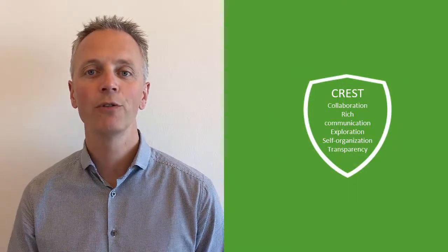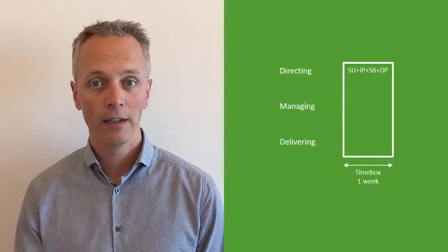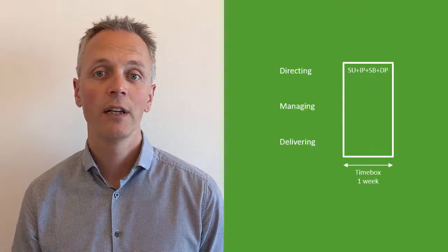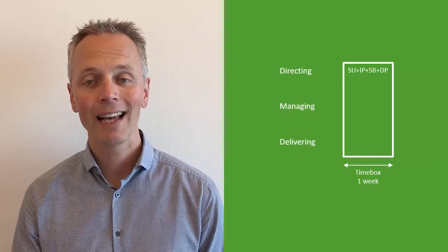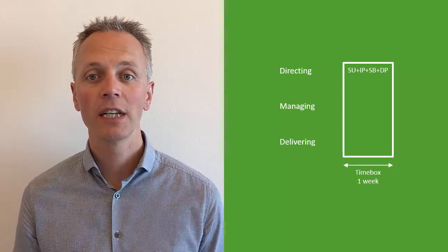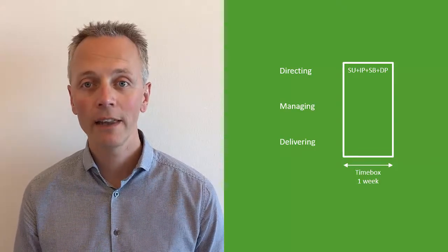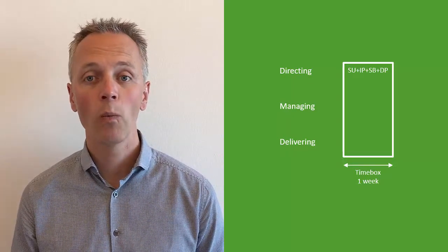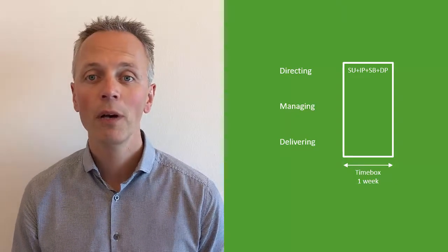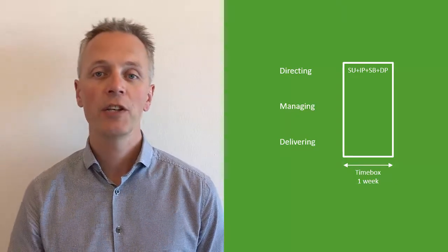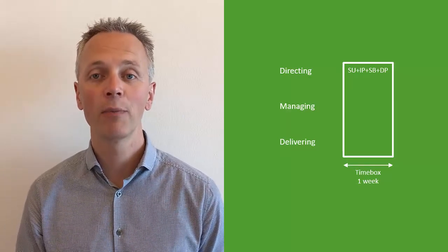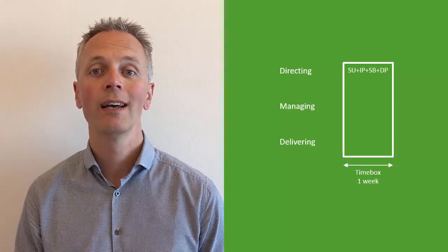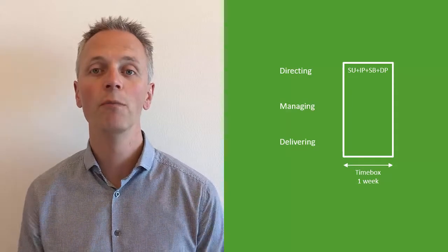And within that time box, you're going to think of people collaborating, using rich communication, working together. So here you're going to think of starting up a project, initiating a project, managing a stage boundary, and directing a project. All 4 of those processes together in one big box. They're all in it together, so they are going to do it together. So for the initiation stage time box, let's say you have a 1 week time box, you get everybody together in a room and you do starting up, initiation, managing a stage boundary, and directing a project, making the decision whether we should go on like this or not, within that time box, in that room, basically.